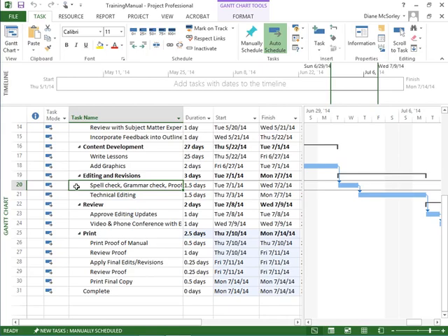When we're looking at our project plan, we may have tasks that are linked, finish to start. But once a task finishes, the next task may not be able to immediately start. Imagine if I have a task that says, pour concrete, and then build on the concrete is the next task. I have to wait for the concrete to harden, to set, before I can build on it. Many times we have a task that requires a delay. After it's done, the next task is the next task, but it can't begin immediately.